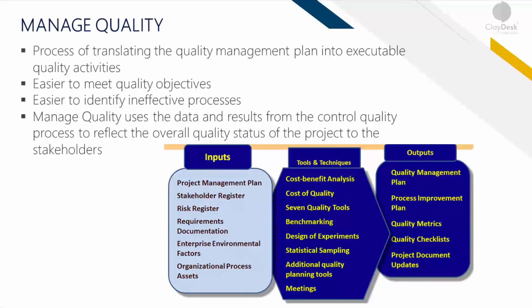Managing quality is the process of translating the quality management plan into executable quality activities, because you can't apply a quality assurance method to the entire project at once. You need to look at each task and activity within your project schedule and decide which activities need to be checked for compliance with standards. The benefit is that it increases the probability of meeting quality objectives and identifying ineffective processes. The managed quality process uses data and results from quality control to reflect the overall quality status of the project to stakeholders, and can be applied at any stage.